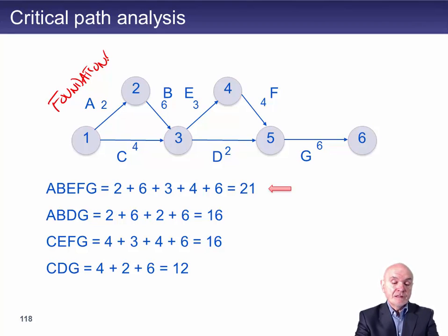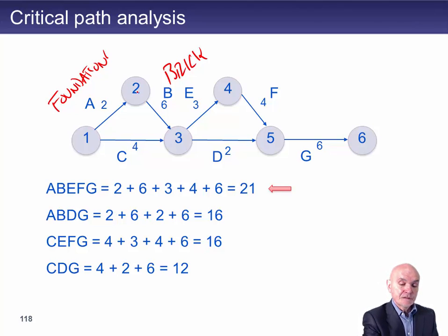And we'll say B then is going to be the brickwork. Now the way this has been drawn, this is saying that first you do the foundations, and only after you've done the foundations, you've got the 2 here, can you go and do the bricks. It has to be in that order, it has to be in sequence. But there's another activity we can be doing at the same time as we're doing the foundations, and we'll say that this is make the woodwork.